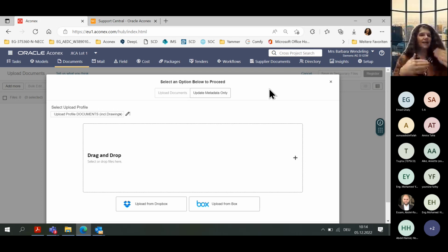In the submittal cover sheet, we will open one then for an example. It mentions the document number and which version of the document. And this submittal cover sheet will be signed then by the project manager, and for the review outcome, by the responsible person from the engineer.